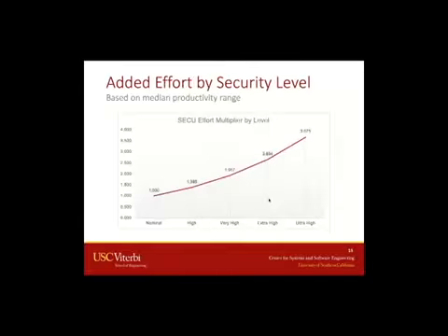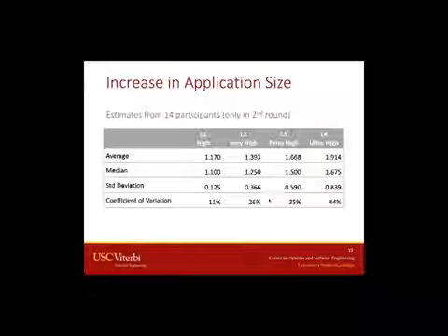Using this productivity range and an exponential growth equation, we can obtain the effort multipliers for each level of the scale. We did this one based on the median.